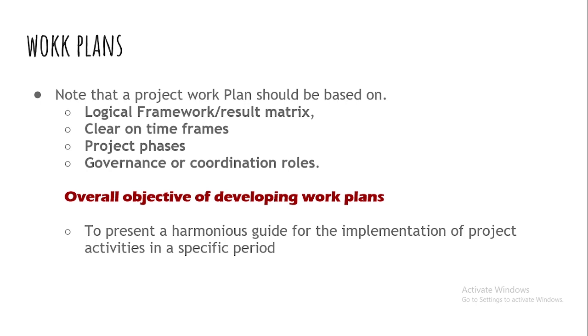Note for my M&E experts and project coordinators that your work plan should be based on the logical framework or result matrix. It should be clear on the time frames. It should be based on the project phases. Let's say a project, maybe it's a program like an Eco-Schools program that runs in phases, like a 3-year phase.